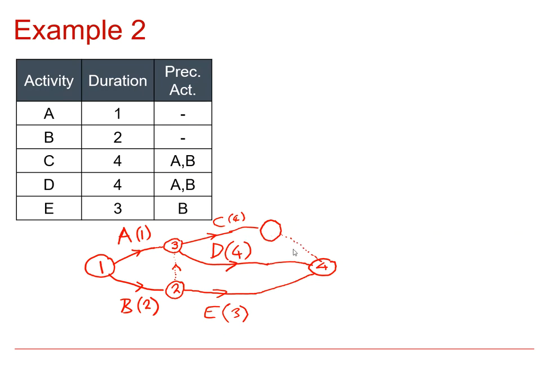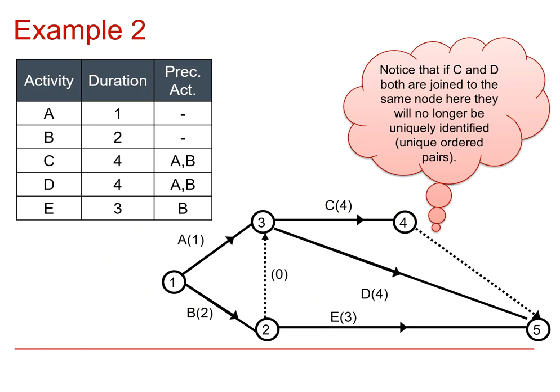But because we've needed the new event, in fact, we jumped the gun calling that 4. So again, I've had to change that a little bit. And as I mentioned earlier, you should be prepared for your first one to be a rough attempt. You might need to cross something out and change it, just because you hadn't anticipated something that should have happened. And of course this needs a direction and a duration of 0. So now we've got our rough version down. We might decide to tidy it up a little bit and do a final version, and that's what you can see there.